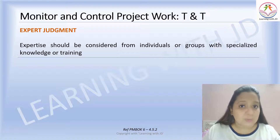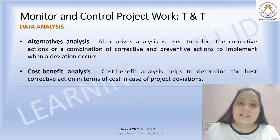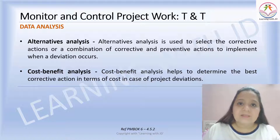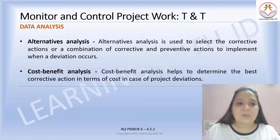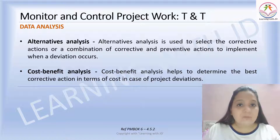Now let's see the tools and techniques. The first is expert judgment — experts can be individuals or groups with specialized knowledge or training. You may also use data analysis techniques. Alternative analysis is used to select corrective or a combination of corrective and preventive actions to implement when a deviation occurs in your project scope, cost, or schedule. Cost-benefit analysis helps determine the best corrective action in terms of cost when there is a cost deviation in the project.